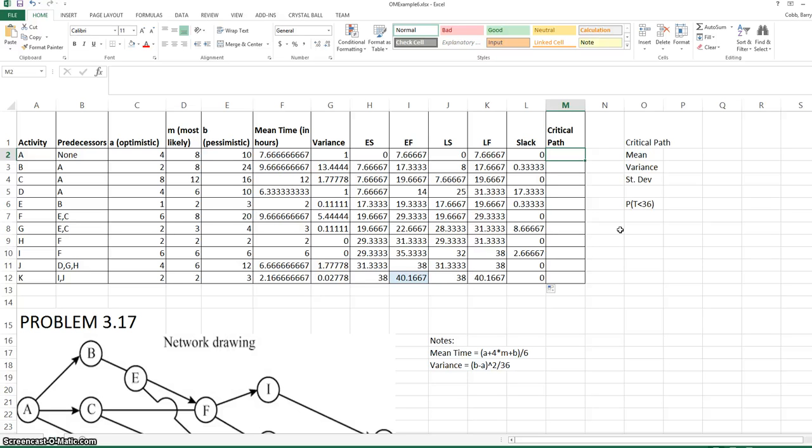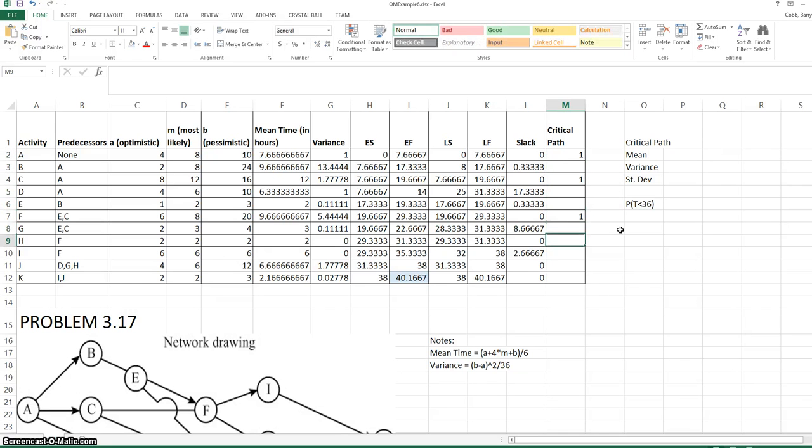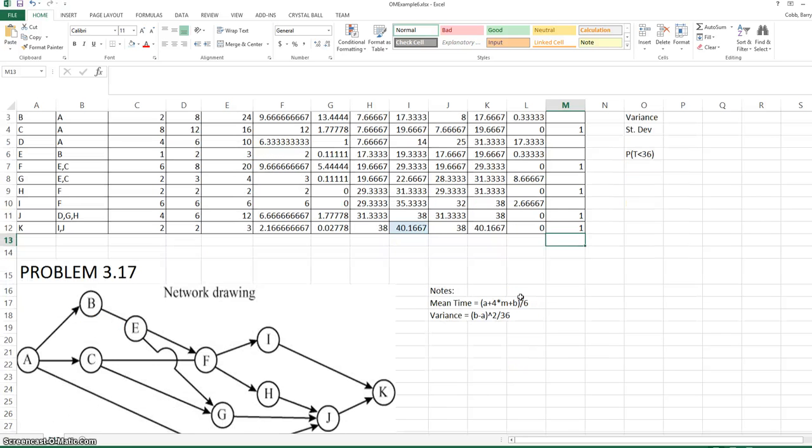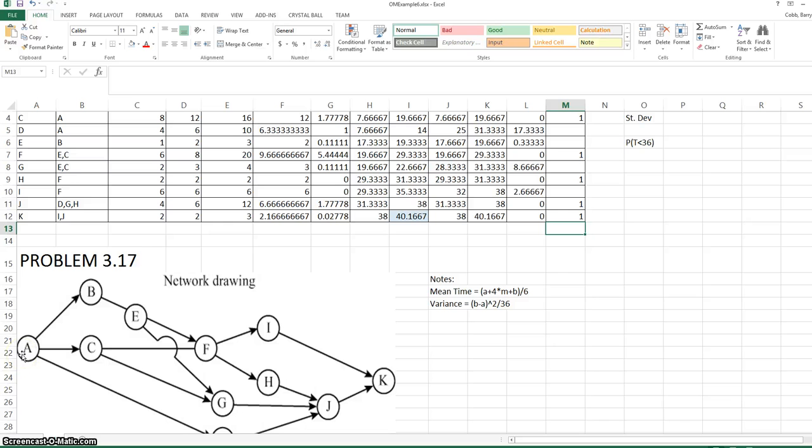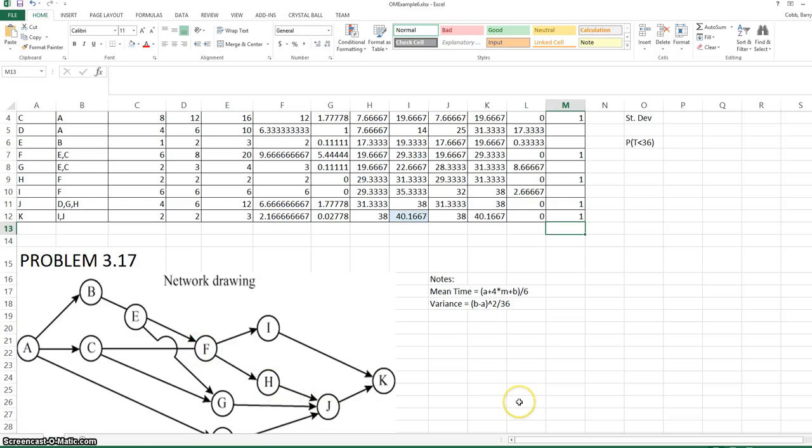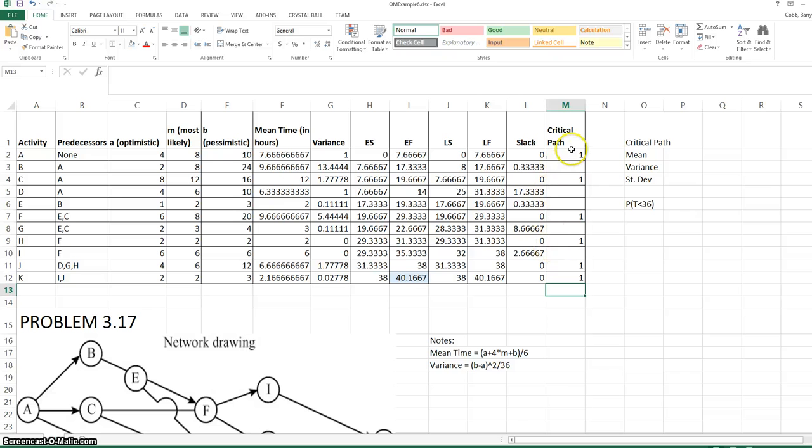Activities that have zero slack are on the critical path. I'm going to denote this by placing a one in this column by the critical activities. I'm going to look to the diagram to make sure we've only identified one critical path, because there could be more than one. The critical path goes from A to C to F to H to J to K. For the calculations we're going to do for the remainder of this problem, we would only want to mark one critical path in column N.